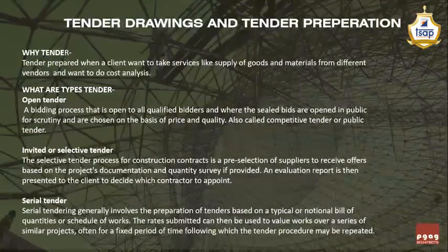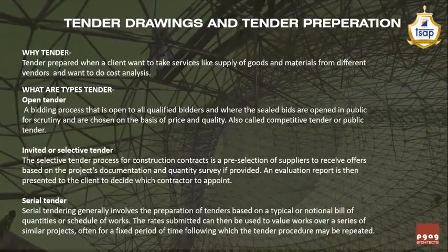You're doing a project which is not a residential project, but a commercial premises, and you're working for a corporate client who needs the tender drawings and the tender preparation to be done. Like for example, why exactly do you need a tender? When the client needs to take services like supply of goods and material from different vendors, and needs to do the cost analysis of that particular project, he needs to float the tender. Then after floating the tender, he will get the cost analysis done, and after the cost analysis he will award the tender.